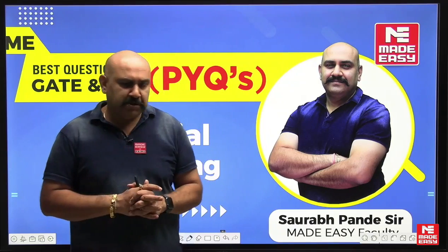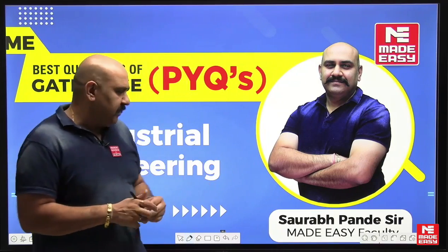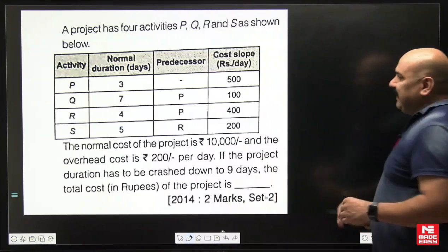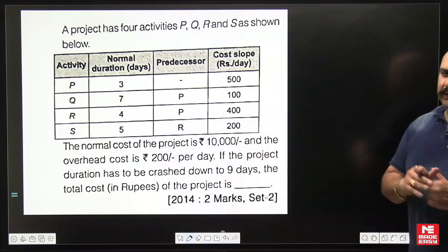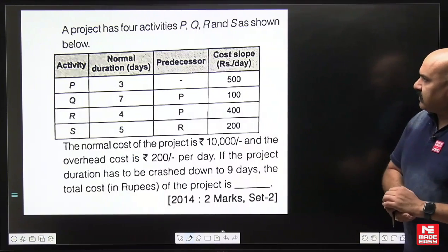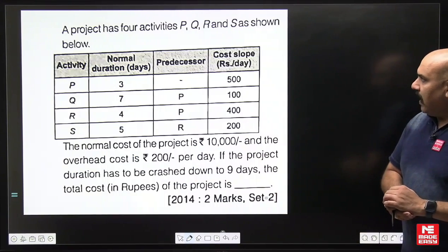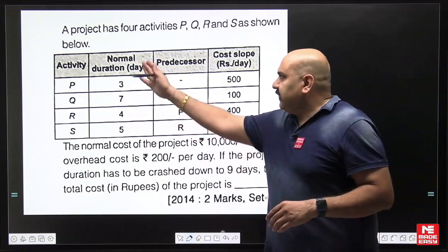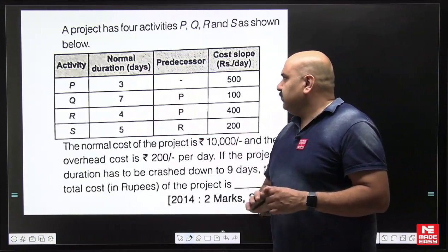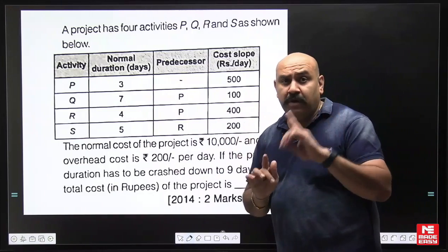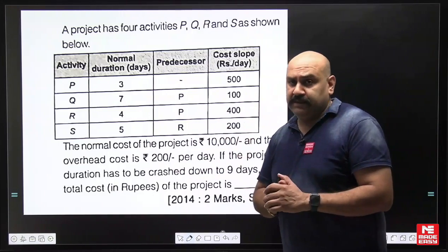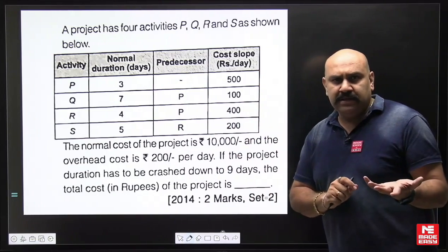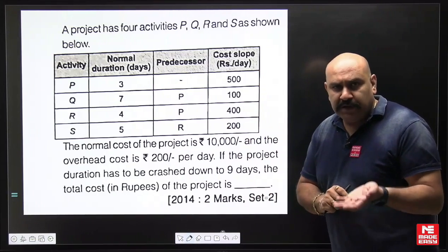The first question I am taking is from PERT/CPM — this was asked in GATE. A project has four activities P, Q, R, and S as shown. The data is given for the four activities: their time durations and precedence relations, from which you have to make a network diagram. Cost slope is also given — it tells the amount of increase in direct cost if you want to decrease duration by one time unit.